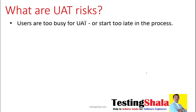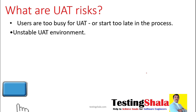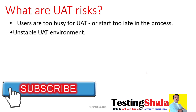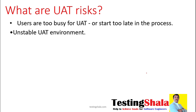What are the risks in UAT? The major risk is that end users are sometimes too busy to perform user acceptance testing, or because UAT starts at the end of the phase, the overall process might get delayed. The second risk is an unstable UAT environment, which requires a totally different environment to be set up before testing begins. The third major risk is inadequate test data in the UAT environment.